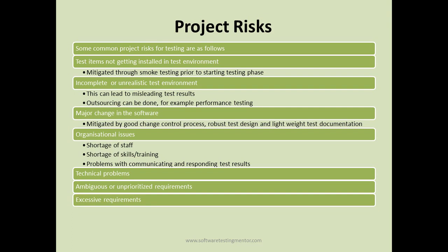Then if there are excessive requirements to be implemented in a very short time frame, that is another project issue. Definitely you won't be able to implement all those requirements in the project. So if there are excessive requirements, either you need more time to implement them, or you need to discard some of the requirements in order to meet the project schedule.